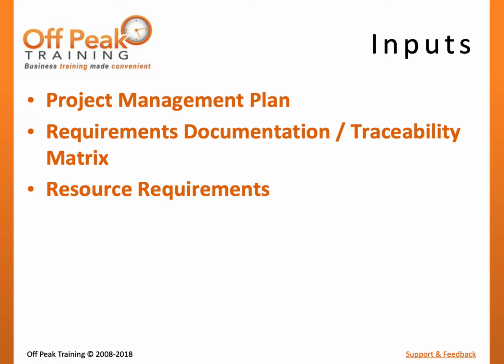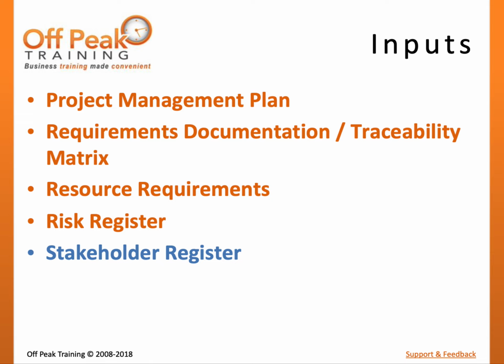Since contractors may be responsible for delivering components or augmenting project work, it is useful to ensure these requirements are properly communicated. Resource requirements will be important to make sure that contractors or acquired resources will have the skill sets necessary to complete their assigned work. Finally, the risk register and stakeholder registers provide background on the project environment. It is important that contractors are aware of the various parties that may be affected by their work and any known risks associated with the work. An understanding of the risks associated with the work will also heavily influence the type of contract that will be utilized.